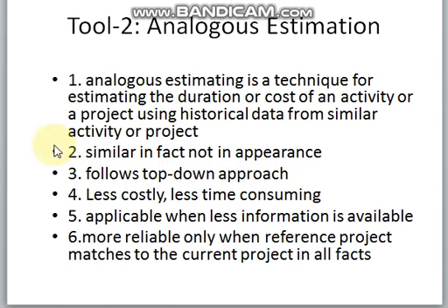So the next tool we will discuss here will be the analogous estimation. Analogous in dictionary means similar things. So you need to take similar activities from the past project or from the previous project where they handled such complexity, and then we tend to estimate the activity duration and cost at hand.